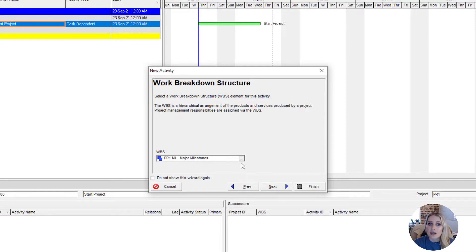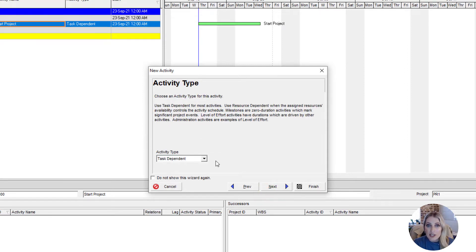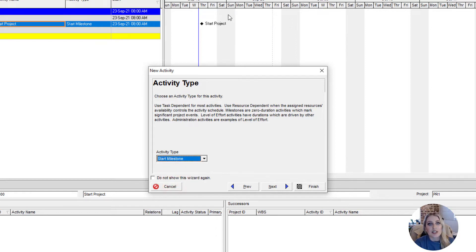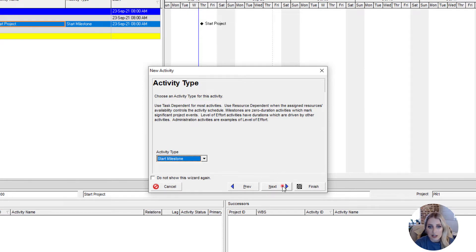If we wanted to change the WBS placement, we could click on the ellipses and select the WBS element we wanted. We'll just click next. This is the activity type part of the wizard. On this drop-down we can change the activity type — it always defaults to task dependent, but our Start Project is going to be a start milestone. A start milestone marks the beginning of an activity or a group of work that is going to be done, and you can also see it pop up in our Gantt chart.